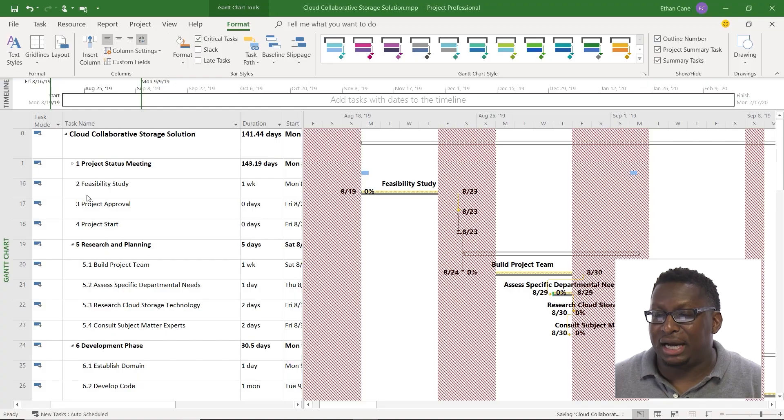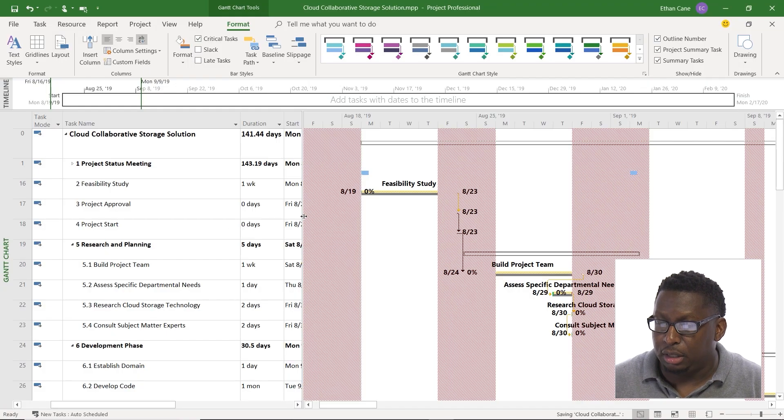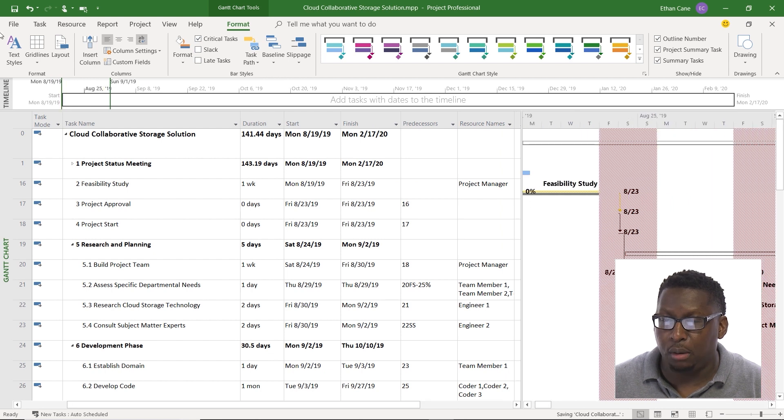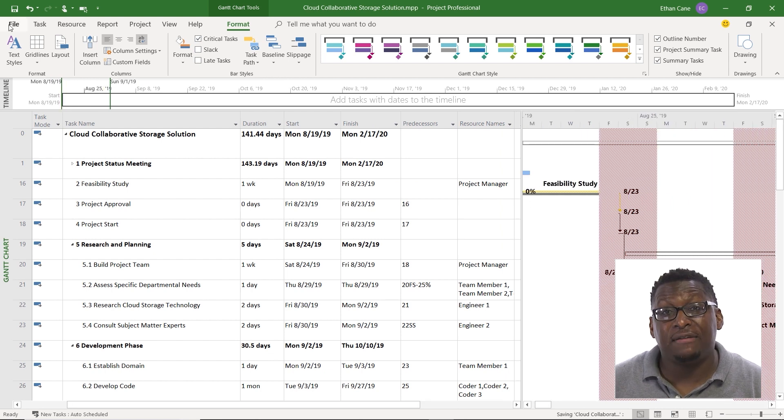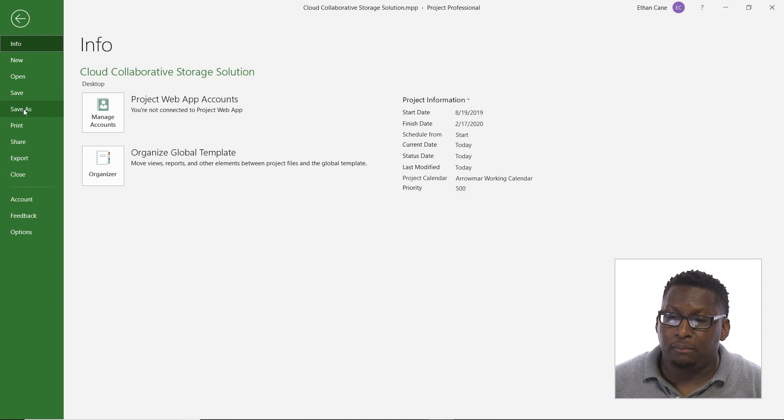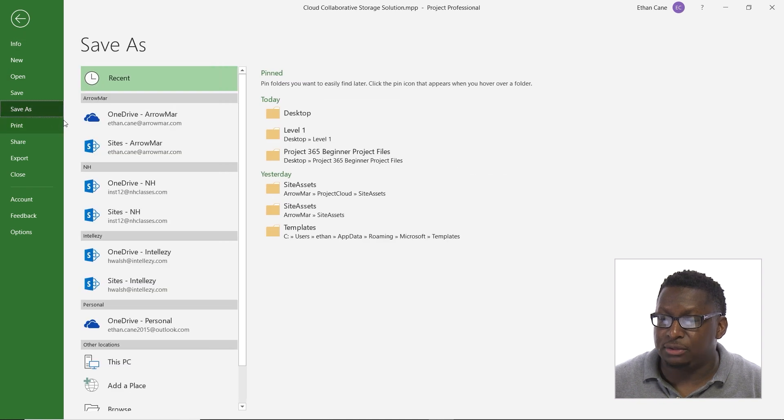One of the ways we can do that is we can export our data to Excel. So we learned how to import, now let's go ahead and export some stuff. I'm going to export my entire project plan here out into an Excel format. How do I do that? I'm going to do file, save as.